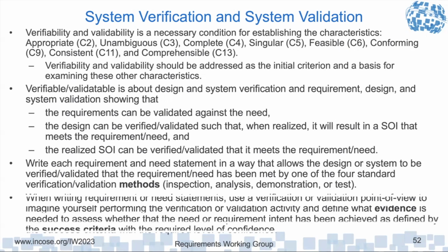demonstration, or test. When writing requirement and need statements, we should use the verification validation point of view and imagine yourself performing the verification and validation activity and define what evidence is needed to assess whether the need or requirement intent has been achieved as defined by the success criteria with the required level of confidence.